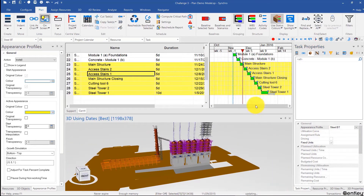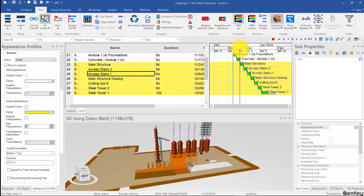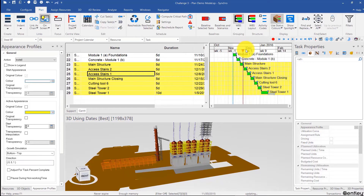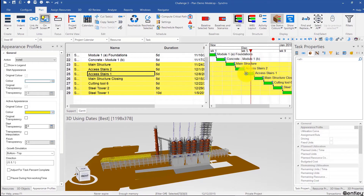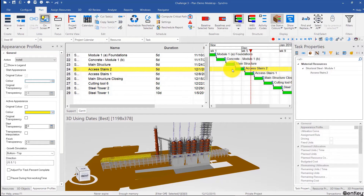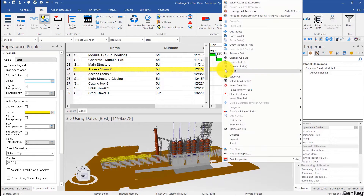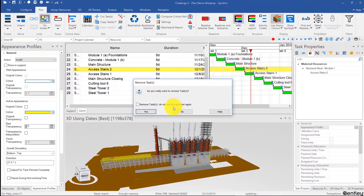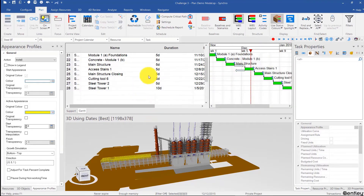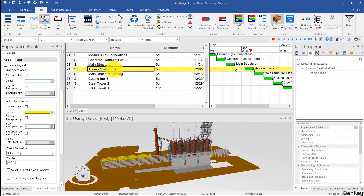Let's see how that works. We have the concrete — that's good — the main structure, then we have the axis stairs. Now the axis stairs can be built in one task, so I'll just dissolve that activity. Dissolve means you're deleting the activity but stitching together the predecessors and successor links. So I'll just right-click and dissolve over here, and then I'll rename that as axis stairs one and two.